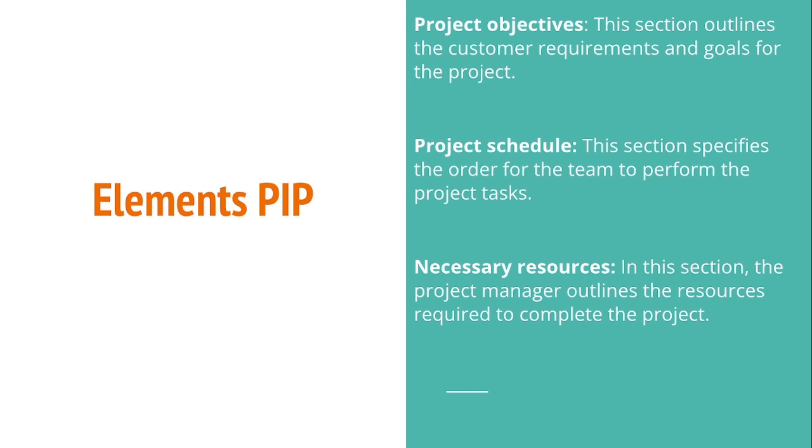so this is the responsibility. So the upper components explain these elements very well. I think they're just feeding into each other. Yeah, where you said that maybe I have Farida, this is her responsibility, and this she'll be able to achieve it in 2 to 3 days. Yeah, so you assign the tasks, set the timelines, that's called the project schedule, to achieve a certain tasks that contribute to the outputs and overall then the objectives.